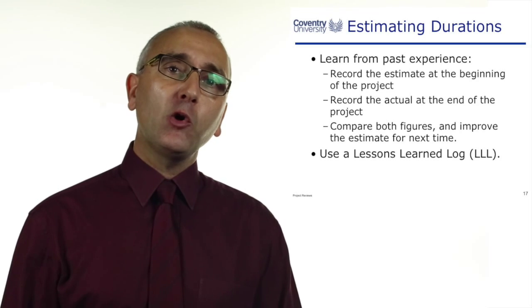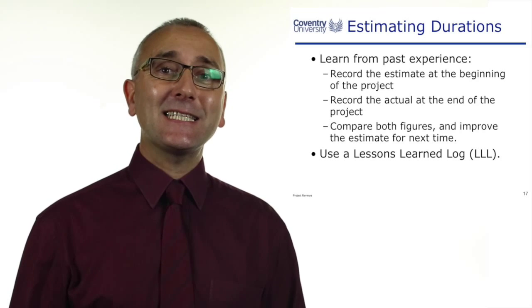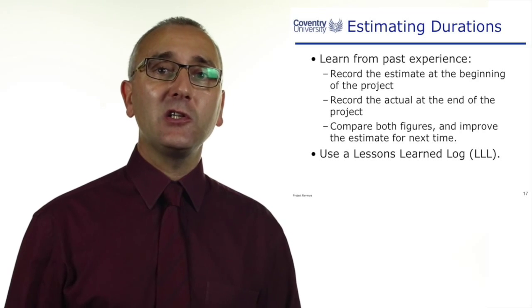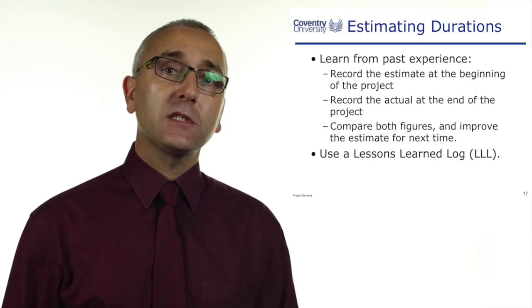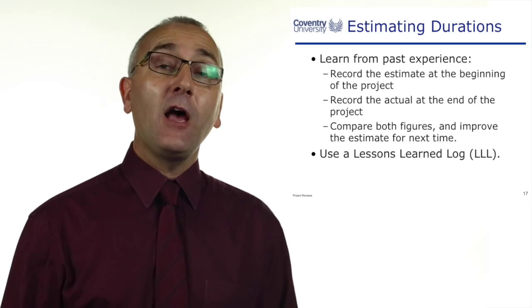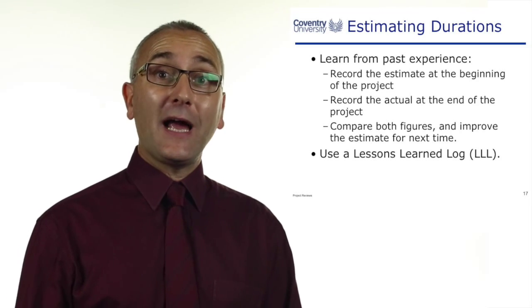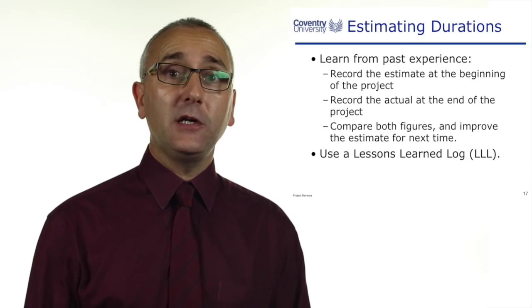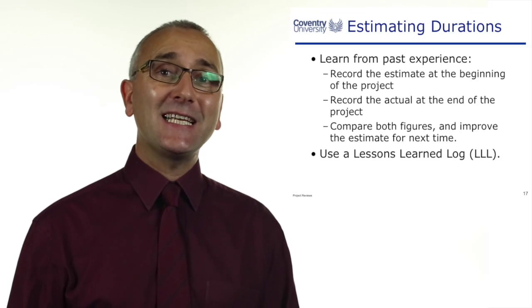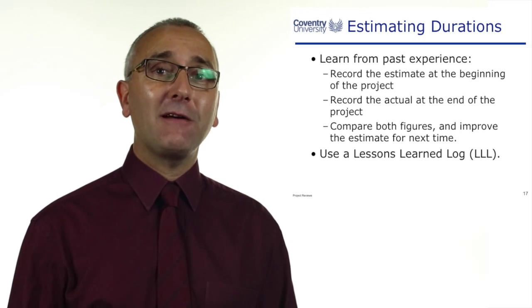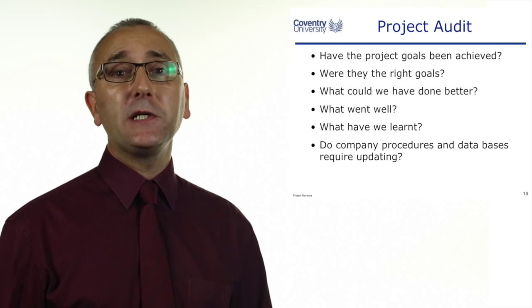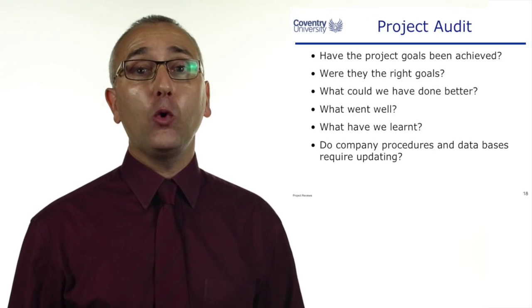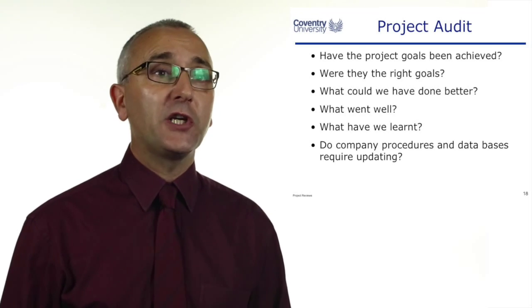And we're recording these things in a lessons learned log — another document issued at the end of the project, available as corporate learning for other projects: the lessons that we have learned in this project. And this is one of the main things we're doing at this project audit or project review.